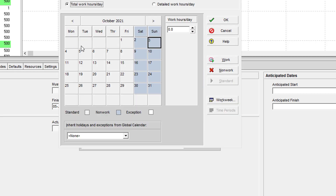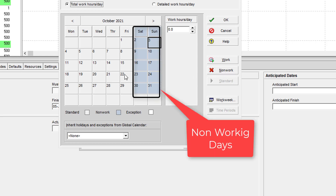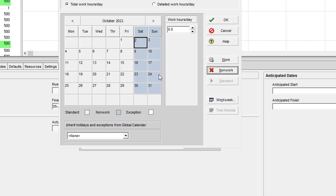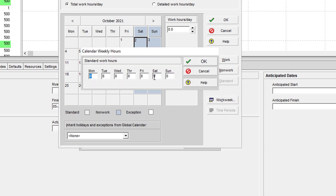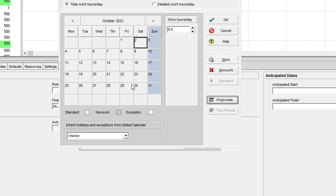In modification, we can define working days, non-working days, holidays, and working hours per day. Dark color shows off days. As we discussed, our project requirement is 6 days working, so now we will change Saturday from a non-working day to a working day.